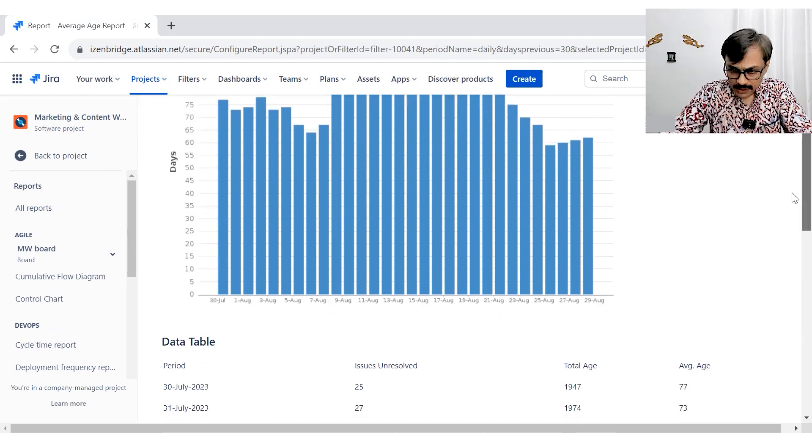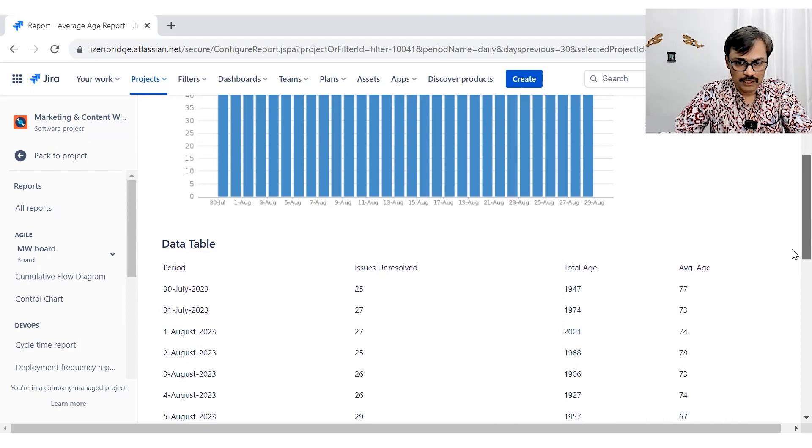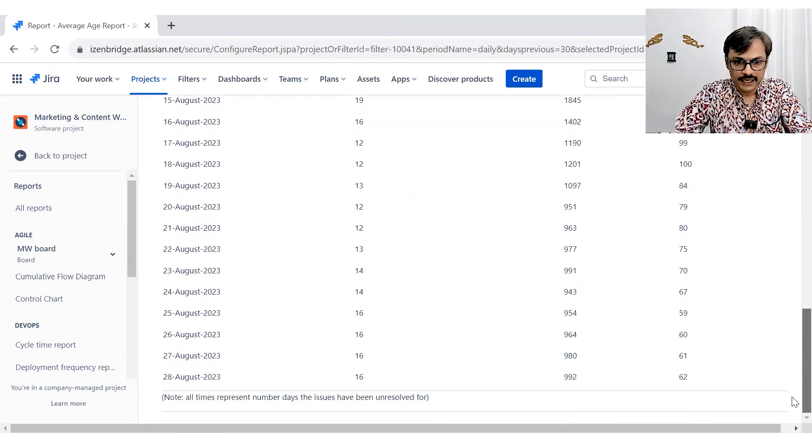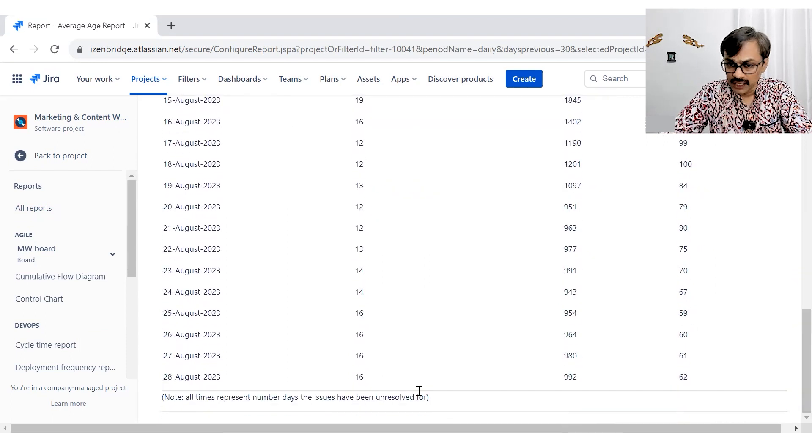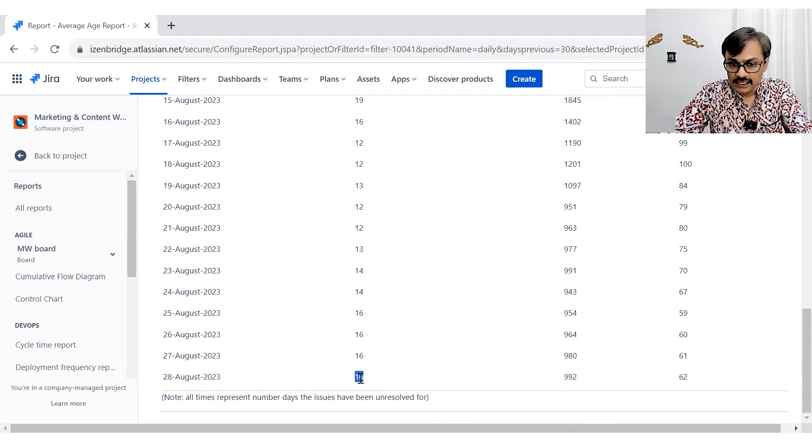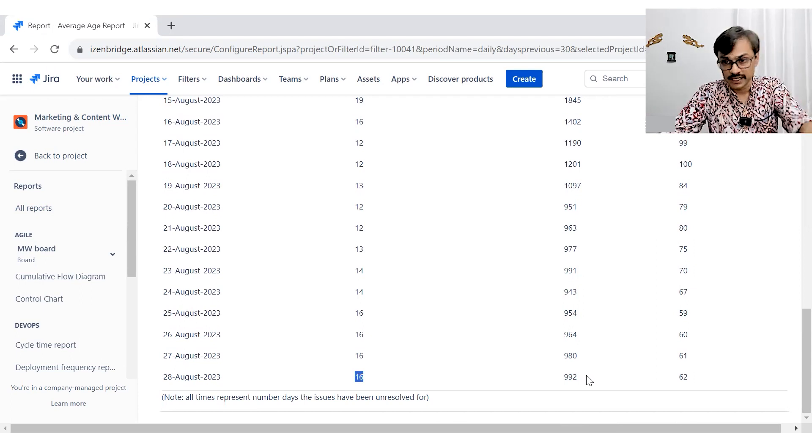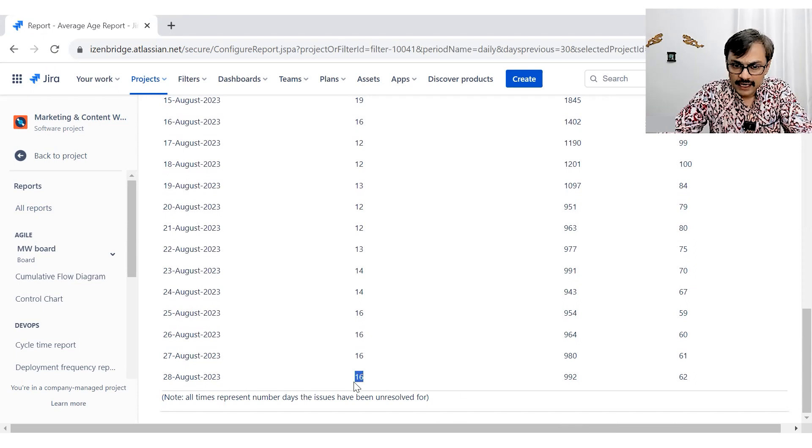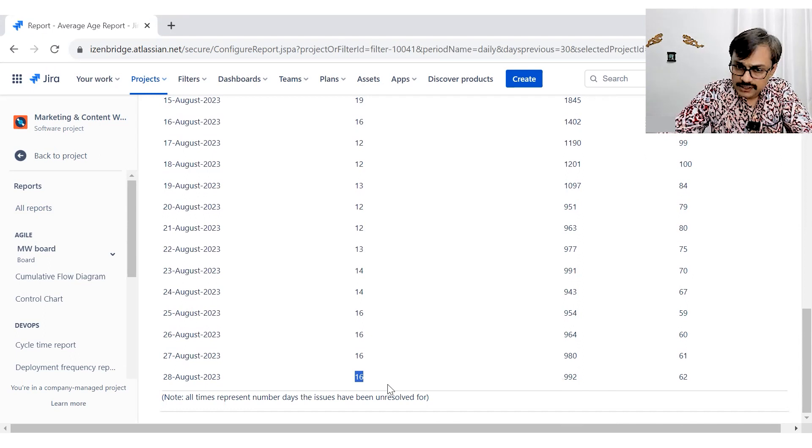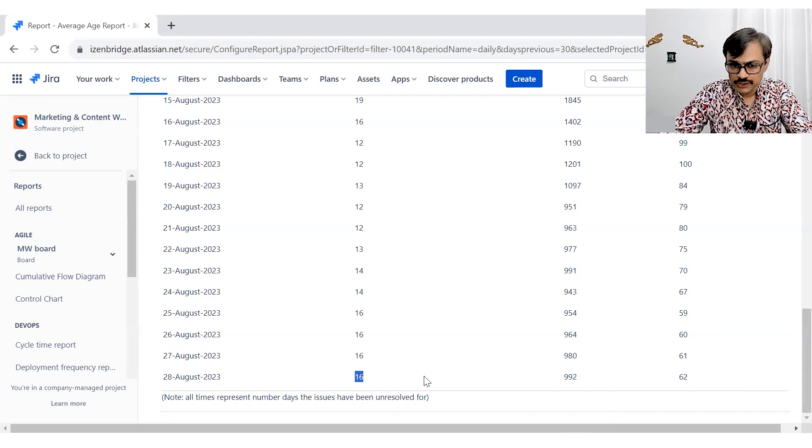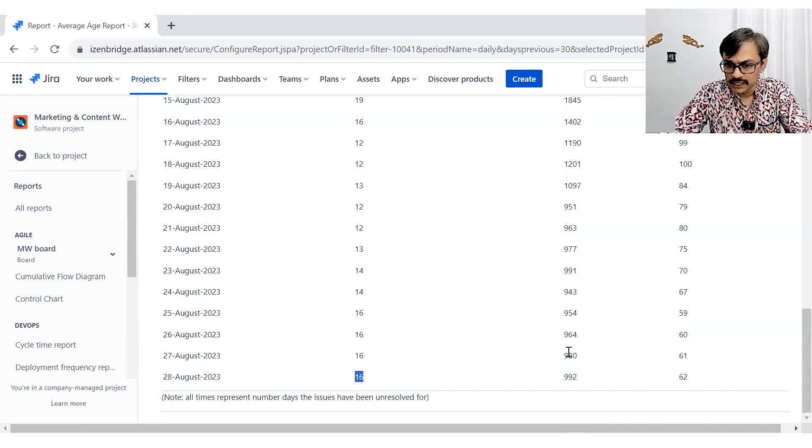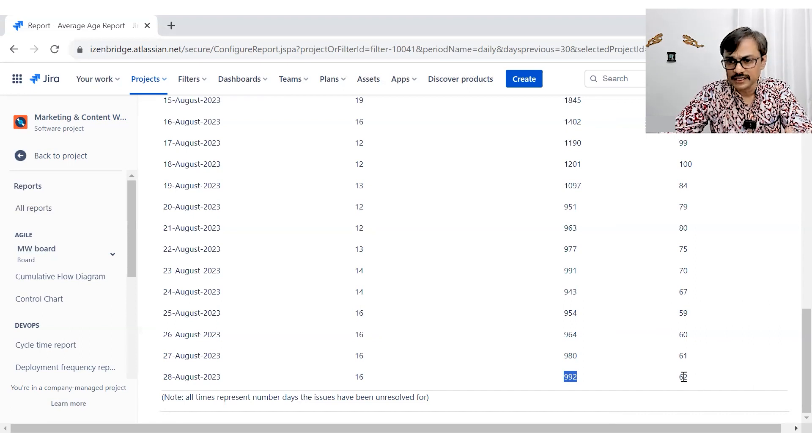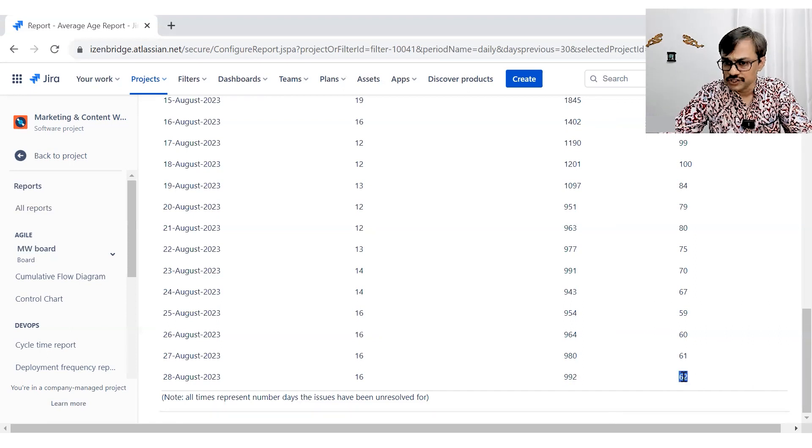Now the below table gives you the overall information. So you can see that if I go to the last row, I have right now 16 unresolved issues because current status is this only, and the age of all these 16 unresolved issues, sum total is 992, and that's how they divide it and it comes as 62.